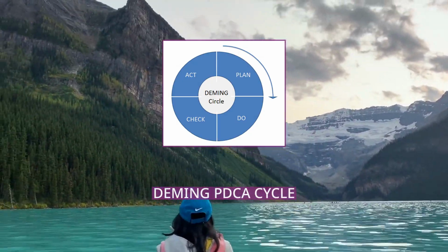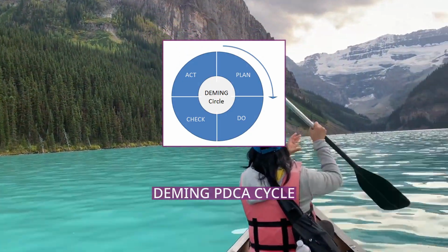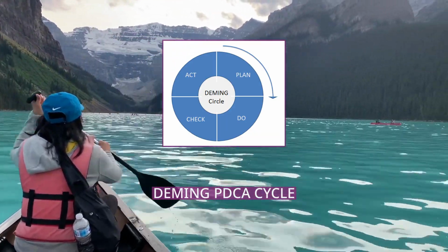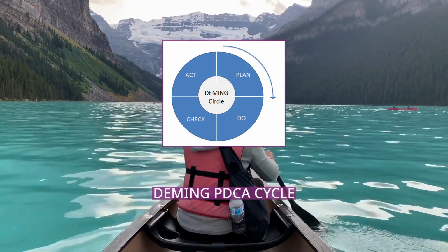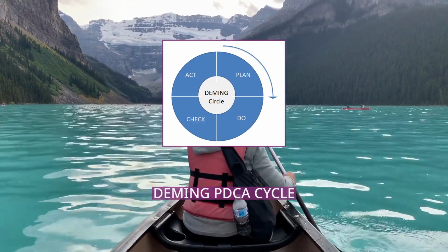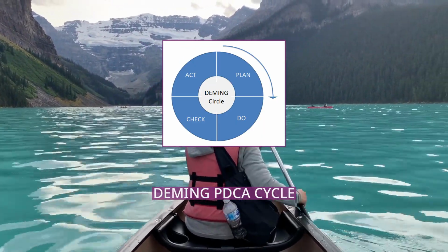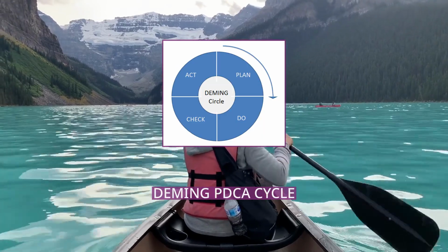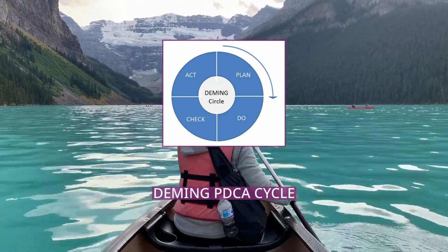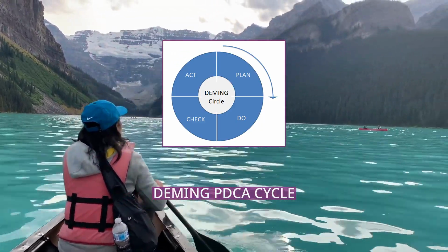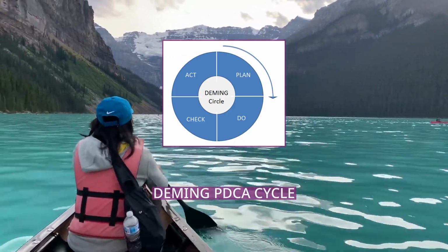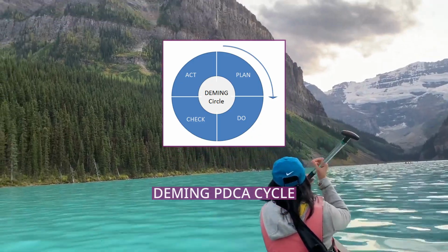Because of the waterfall method of go/no-go decisions at the end of each phase, the technical crew would have to make a formal change request in order to make corrections in the detailed sections of the basic design. Such changes were often confusing for the customer, because these originated from the project team rather than directly from the customer requirements, even after a change freeze was put in place. Usually the customer was only allowed to produce requirements up to and including the functional design in the BD phase. After that, the customer had to wait patiently until acceptance testing in the implementation phase.